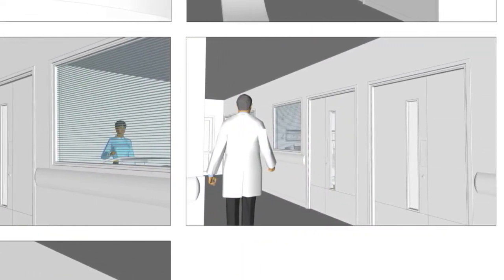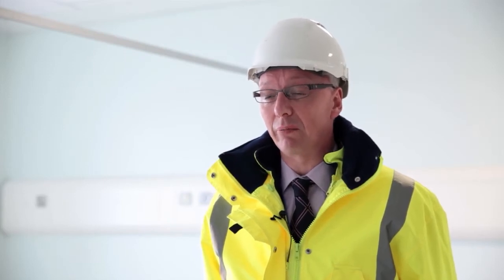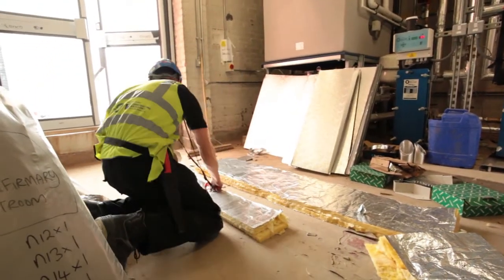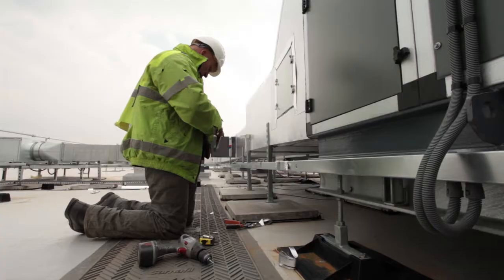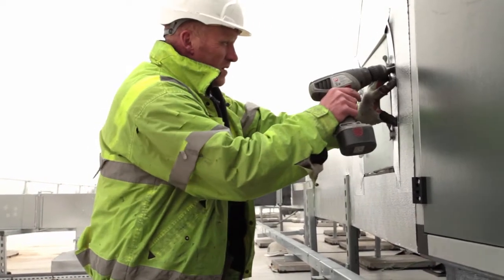Once we've got all of that detail, we'll have a costed plan that we can then take forward to business case. And once the business case has been approved, we would then be looking to secure planning permission from the local planning authorities before we're able to commence. That process for something of a significant size could take up to a year to complete. So having then commenced with the construction for the facility, obviously the construction period, depending on the size of the development, will vary, but we will then be looking to secure handover from the main contractor, which basically gives us ownership of the facility, and then we will look to commission the unit before it becomes fully operational.